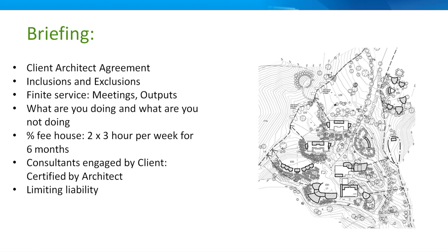So in a fee proposal, you need to say what do you want, this is what it will cost, and this is the limit. For the CPS Credit Union, we did 18 planning options for one of their branch offices. How many are you going to do? Just define it, quantify it. Otherwise, you end up learning it from scratch like I did. You start to say, next time let's put a limit on the number of meetings, and then evaluate what additional meetings cost. And by the way, that will get rid of a lot of problems.